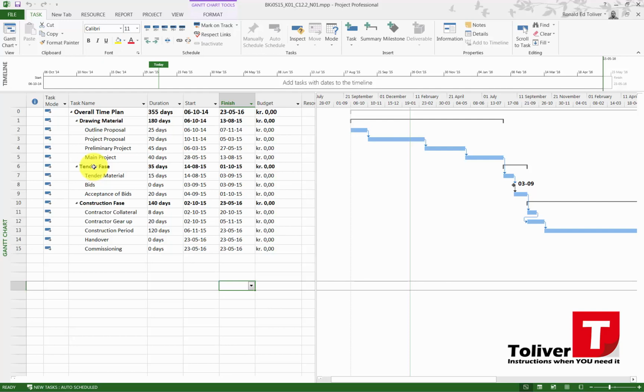I estimated that the project for the house plus the site operating cost, the cost due to weather, and the unforeseen cost is 6,050,000, and I estimate that I'm going to be getting 8% of that as consultant fees, and that's 484,000 kronas without VAT. With VAT, that is 605,000 kronas.